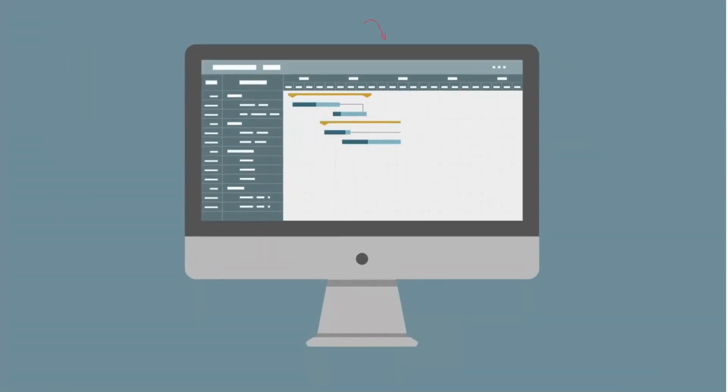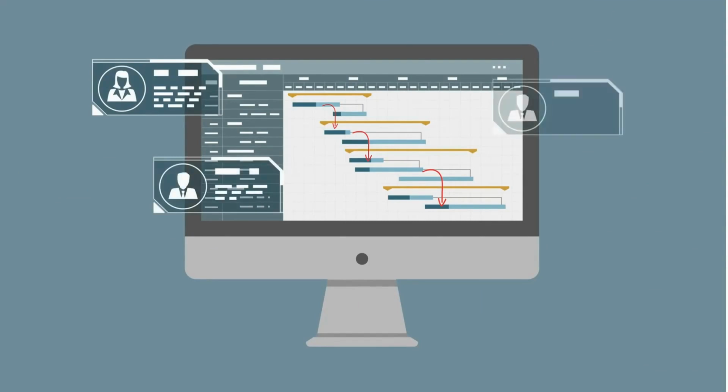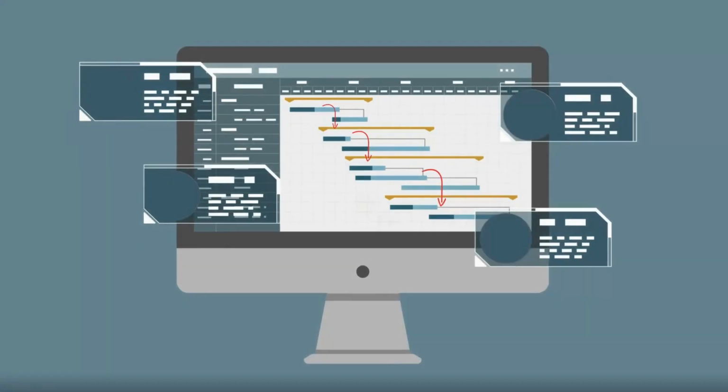Knowing your critical path helps you to prioritize what really matters. Tasks on this path have no slack. If one falls behind, the entire project is delayed. It also shows you where you have flexibility. Tasks not on the critical path may have slack, meaning you can delay them slightly without impacting your end date.